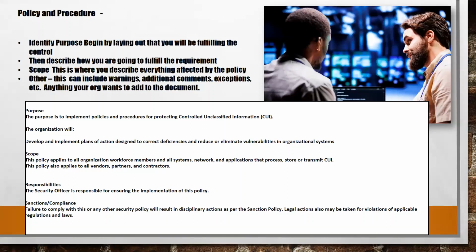Now, I've seen an auditor from Boeing come back and say, you are not vulnerability scanning your infrastructure as many times as we would prefer. So then everybody had to come together, have a change control meeting, and decide, are we going to do multiple vulnerability scans on our network? The IT infrastructure people said it will not put an additional strain on our network, so go ahead, we can do it. That change was approved, and they changed their policy to meet the requirements for vulnerability scanning that Boeing was asking for.